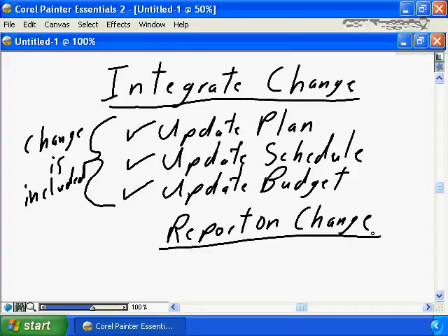In your next status report, your next weekly status report, your next monthly status report, you need to inform all the project stakeholders that on today's date, we integrated a new change. This new change resulted in a 3-day schedule change, and this new change resulted in a $5,000 increase to the project budget. We're not talking project overruns. We're not talking that the project is delivering 3 days late. We're not talking that the project is delivering over budget.